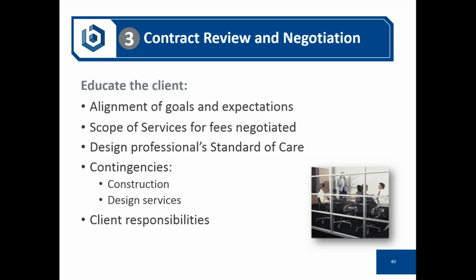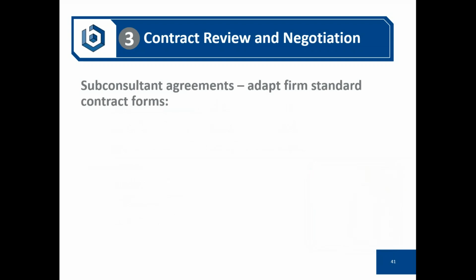However, many of us work under agreements that are not AIA agreements. They might be custom drafted by an owner's attorney, or they might be provided by a university system or a hospital system, and they tend to be a little bit light about what the client's going to do. So you want to make sure that they assign a decision maker, they establish budgets, they provide necessary project information such as site surveys, geotechnical and environmental reports, and other things that are listed in the AIA agreements.